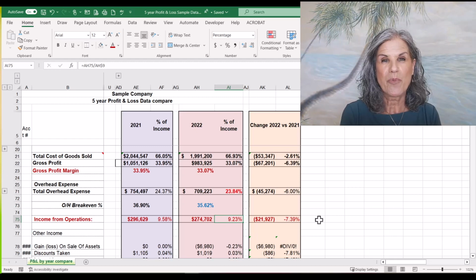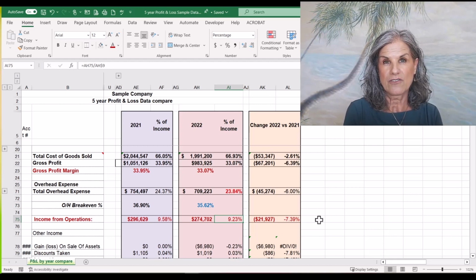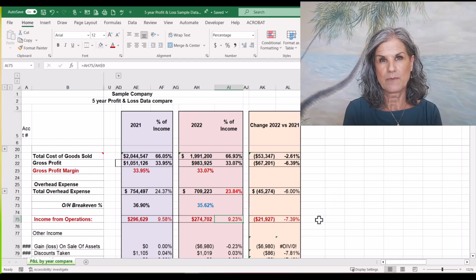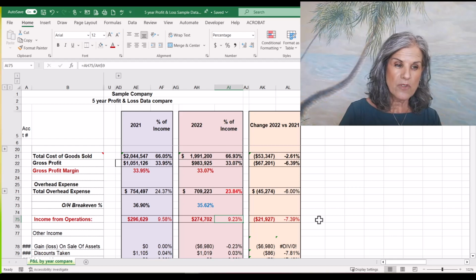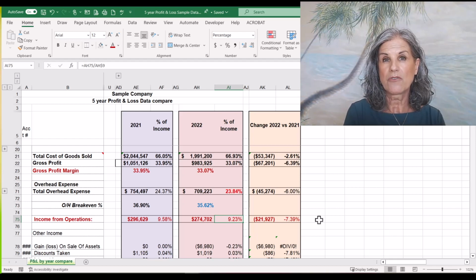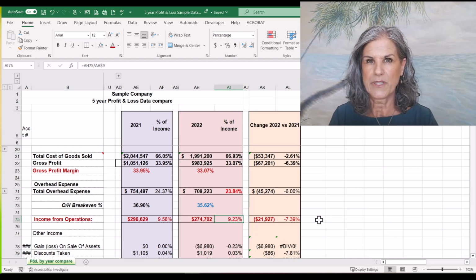So if you're a sole proprietor and you don't take payroll, make sure to add that to your overhead dollars, right? That's important because 8 to 10% is after your compensation as a principal. Really important. And even if you take part salary and part draw, and that's your total compensation, both of those, stick that draw number in there for the purpose of doing this analysis so that you can really look at, am I getting that kind of rate of return?